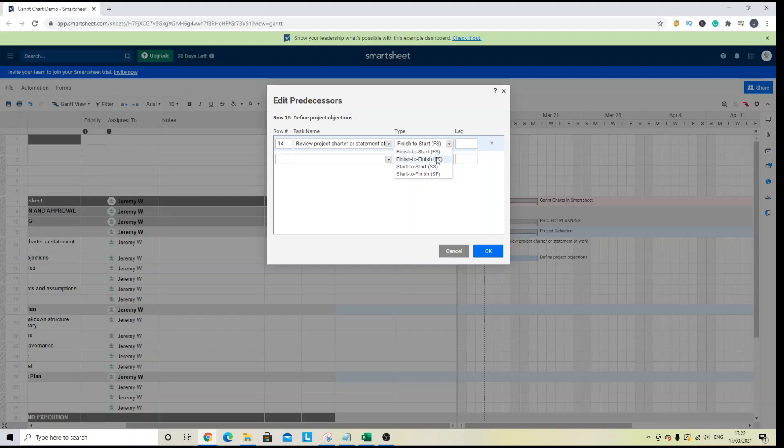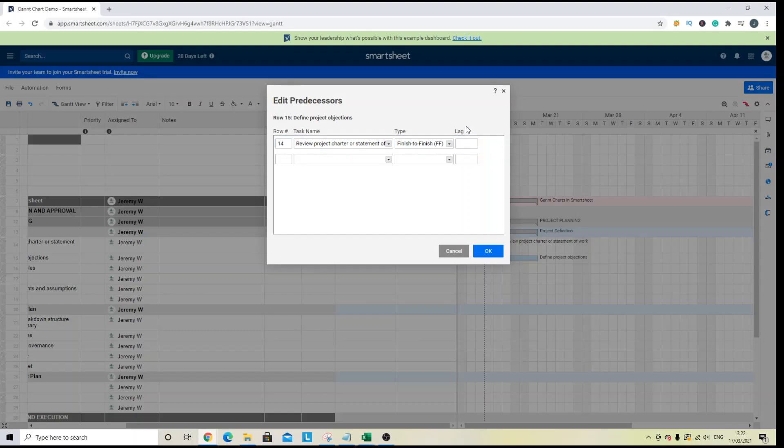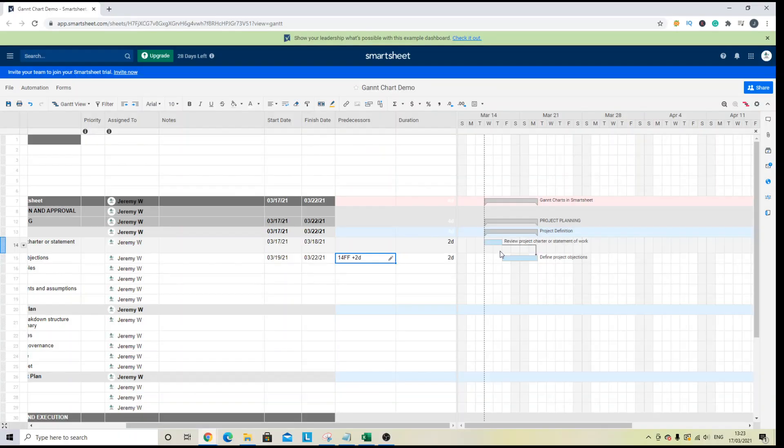So, for instance, let's change it to finish to finish. You can add the lag, so any days in between the tasks. Then you hit OK. So let's say 2, for instance. Hit OK.